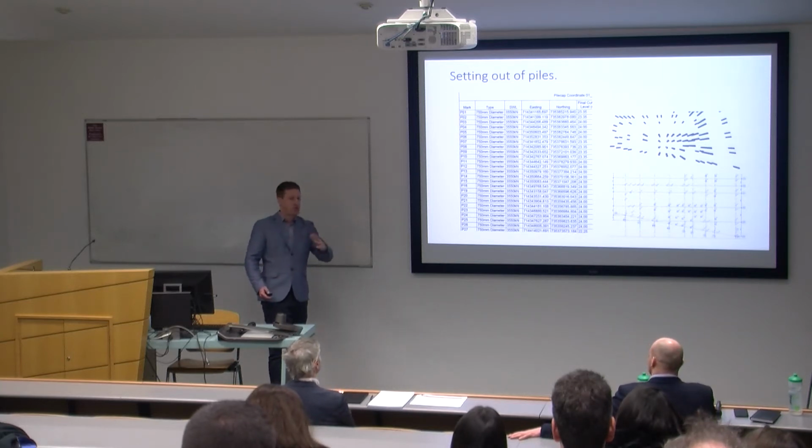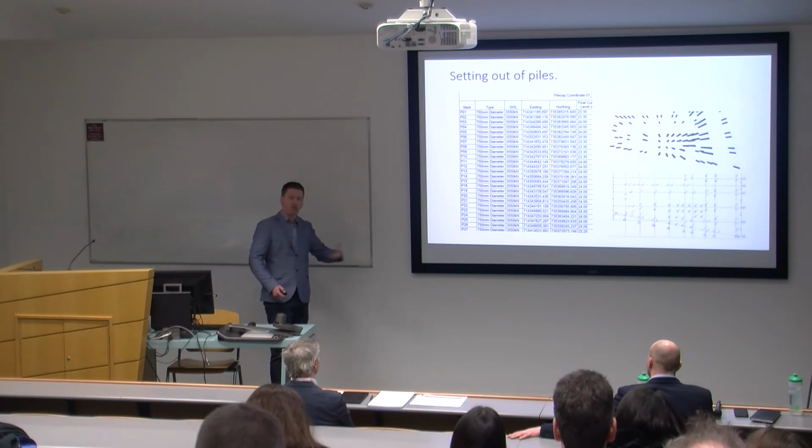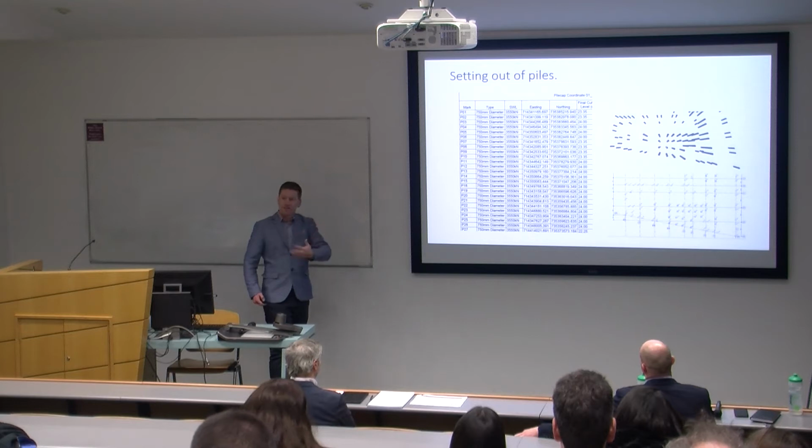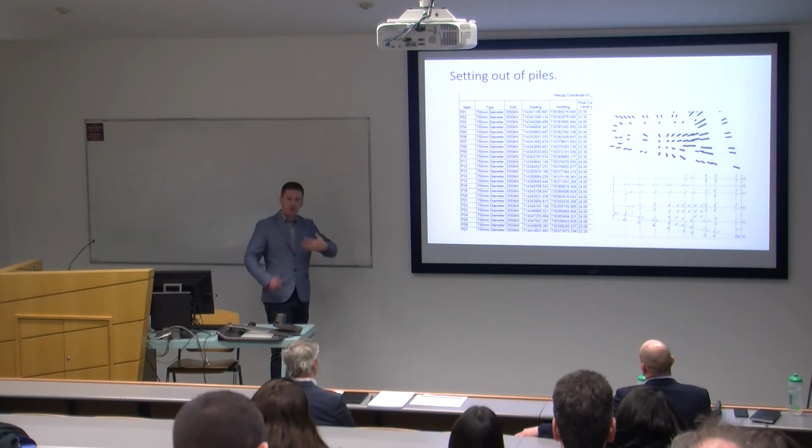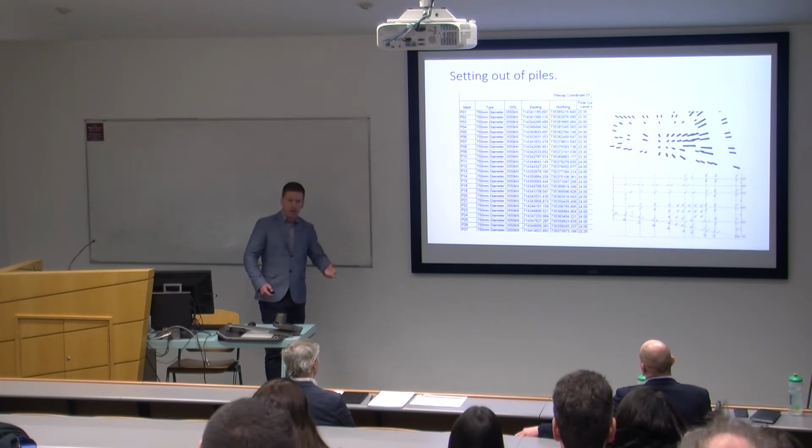So you're doing something 2 or 3 times there, which you really shouldn't be doing. But sometimes the way the models are drawn, the way the designers do them, that kind of leads to those issues or challenges on site. So you could look at it as lessons learned. For the next project, when you're bringing your design team in, you want to be talking to the design team and getting them to issue their models so that you can use them on site and work with them more efficiently, rather than having to take a step back to go forward.